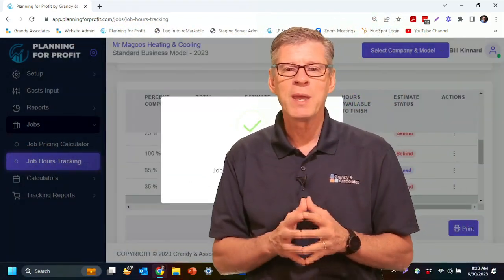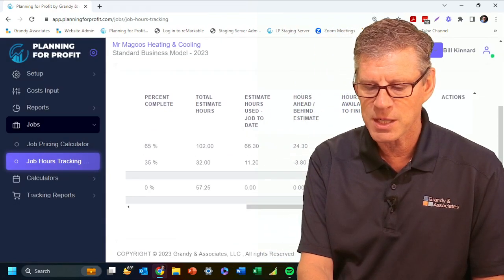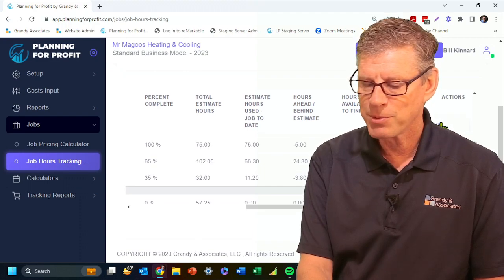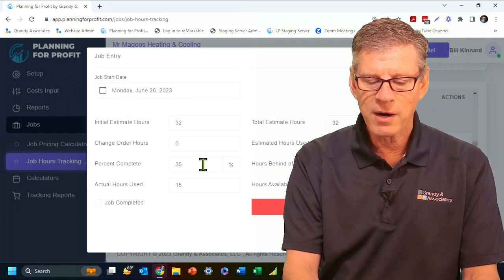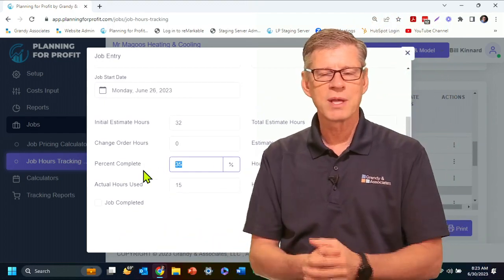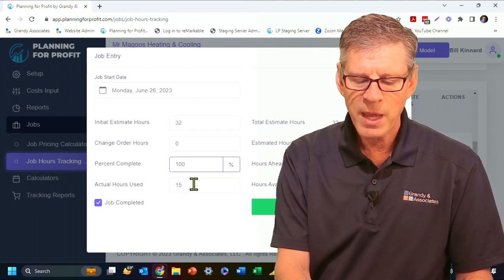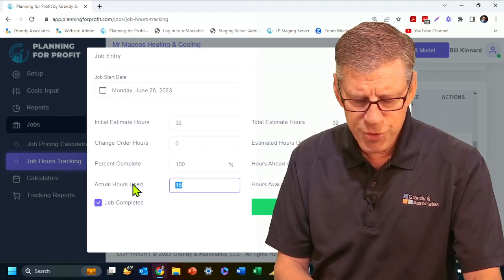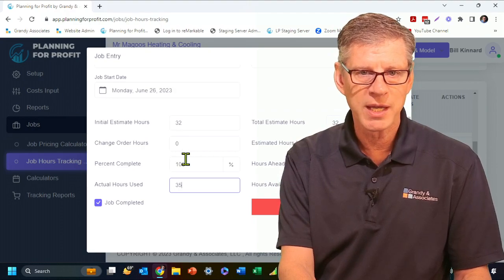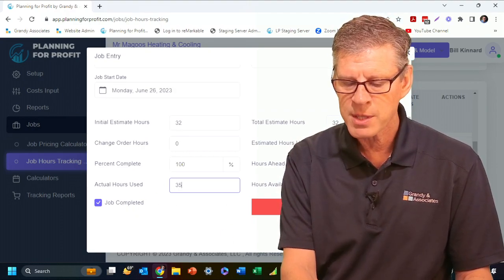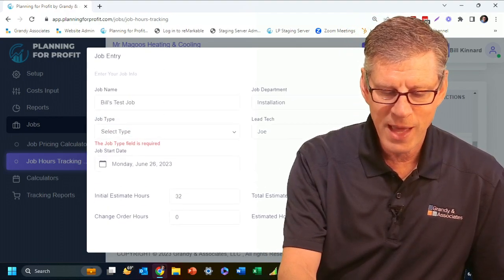It will track this thing each week. What I would do is simply come right back to this particular job. I'm going to go back and I'm simply going to edit it, and I'm going to edit those 2 items. Joe, how far along are we? Joe's saying, okay, we're now 75% done. Or in my case, I'm going to say we are 100% done, and we actually got it done in 35 hours. Right, so at that point, the job is now complete. You can see as soon as I keyed in 100%, it completed the job for us. I can accept that job, and it will now store that data.